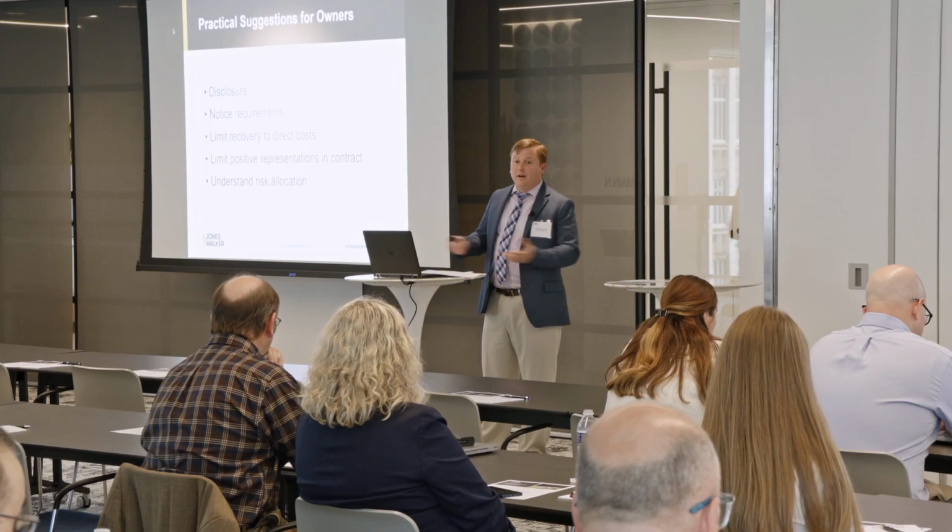So even if you have these exculpatory clauses that I mentioned earlier, whether it's a geotechnical disclaimer or a site inspection clause, you may still not avoid liability if you are making positive representations in the contract of what the site or subsurface conditions are. So you just need to be cognizant of, are you making positive representations about the subsurface? And if so, how many are you making? Where do they appear? We're not just looking at the contract here, we're looking at any geotechnical reports or anything else that might make up the contract documents.